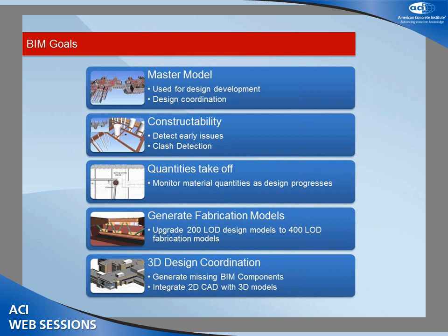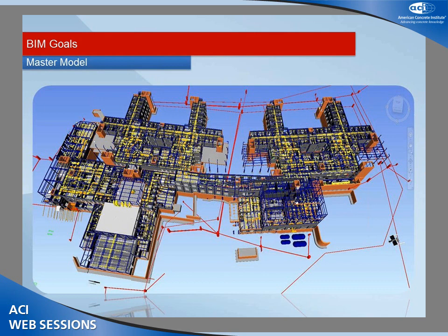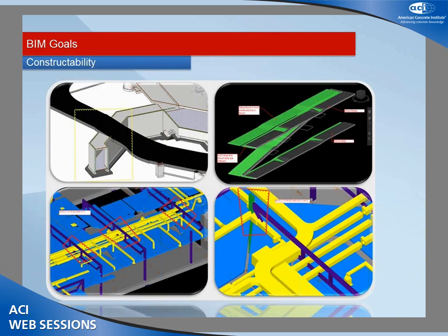A few examples of what we targeted using 3D systems on the project. We maintained a master model — similar to how you'd maintain a master set of contract documents — and did constructability analysis using clash detection to make sure all systems would fit together. We used the models for quantity takeoff to quickly evaluate volumes of concrete and square footage of curtain wall. We also brought in fabrication models and ensured they worked with all other fabrication models. The master model combined content from many different companies. Ellis Don modeled placeholders for things we didn't get from subcontractors — like the peripheral underground drainage systems — filling in the blanks where necessary.